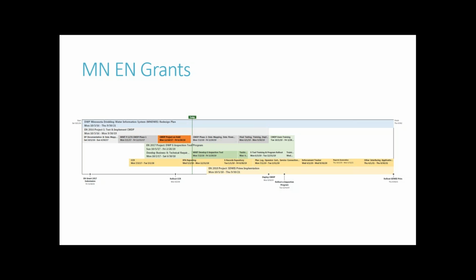It started with complaints from staff that our system is old. At that time it was 12 years old. The manager didn't know which part to tackle first, so a lot of JIRA tickets were piling up and there was no prioritization system. I decided to take 2 approved projects that had gone through Min-IT and gotten approval but then got stuck, because we didn't have a business requirement document to provide them. We don't have a cross-functional flow chart. So we were expecting our IT service in a different department to understand our business.